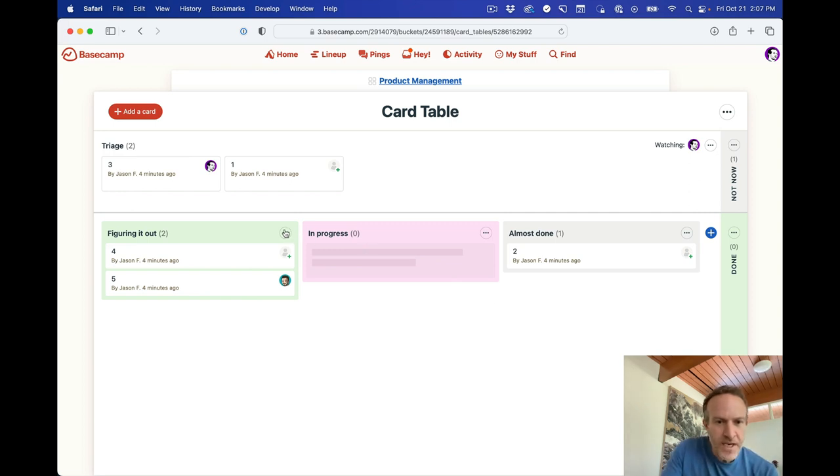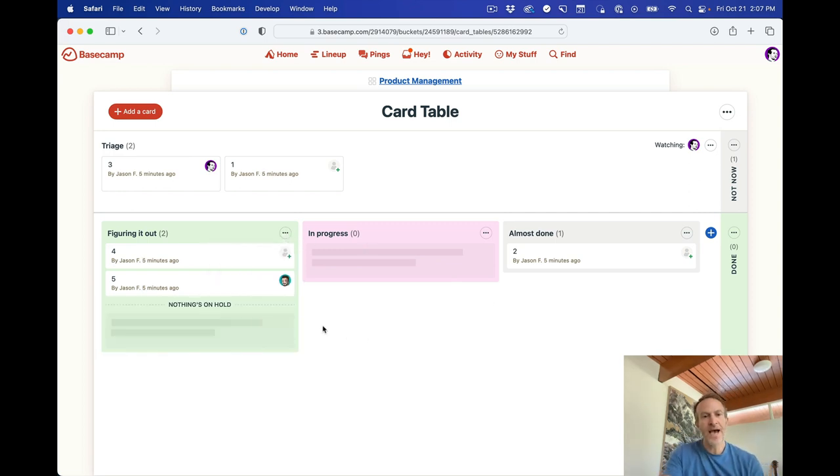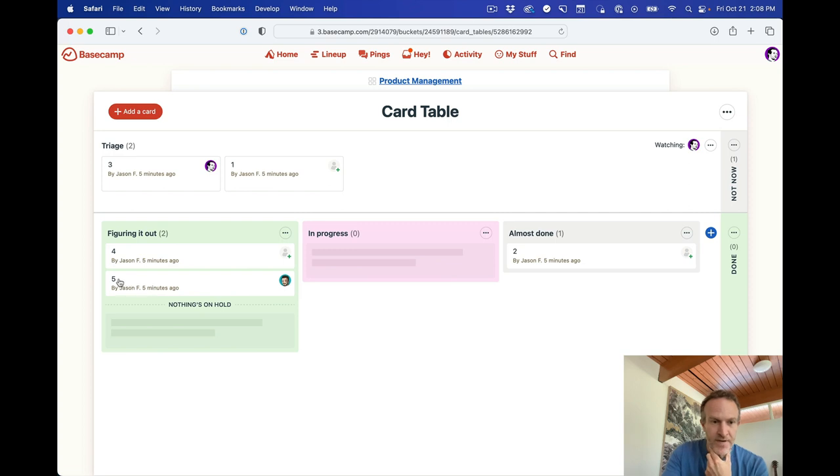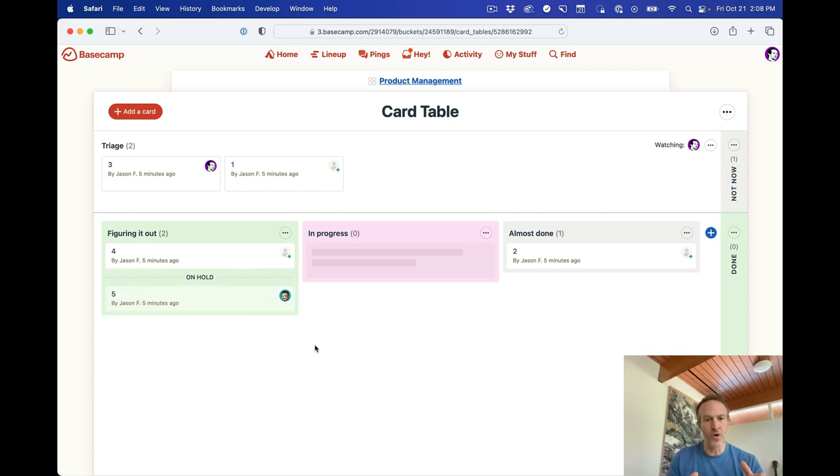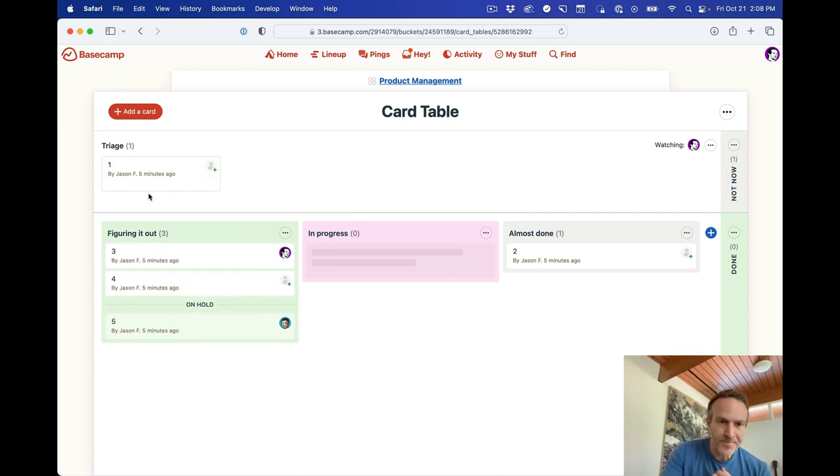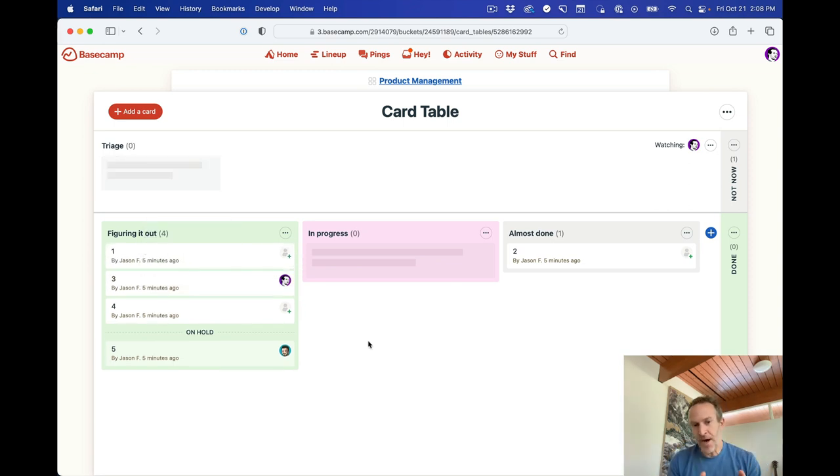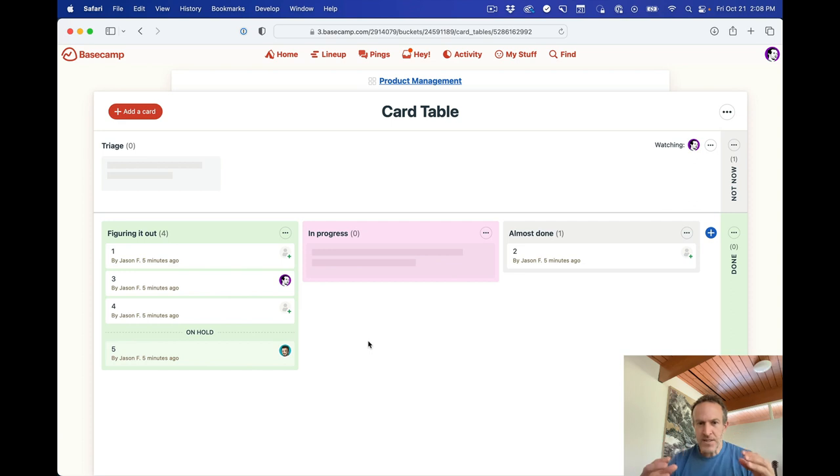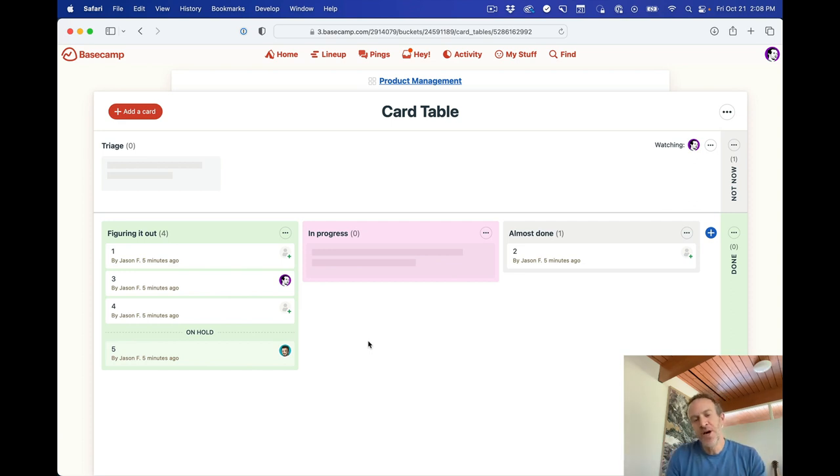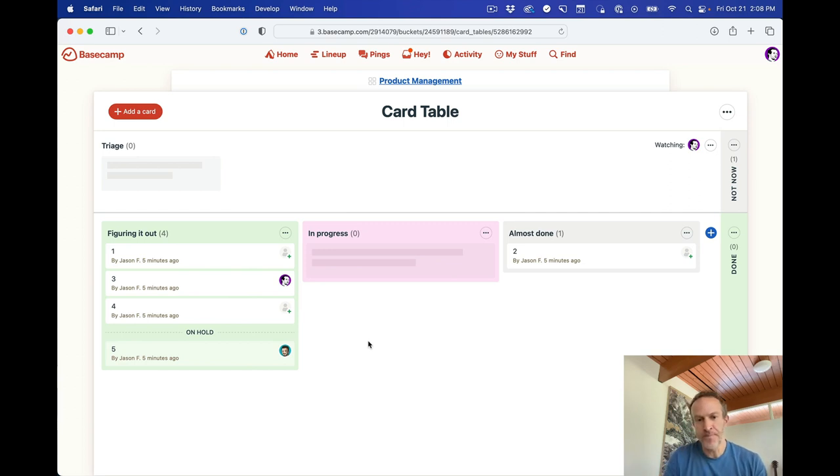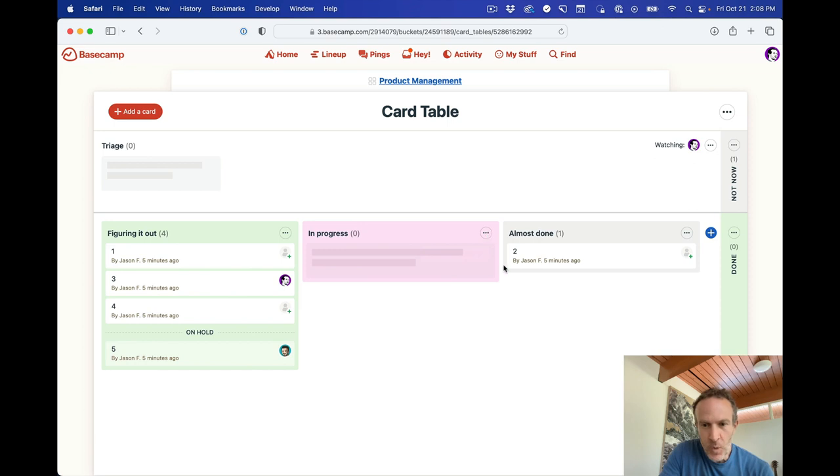So in any column, you can say enable on hold. And now there's a little section at the bottom of a column called on hold. In this case, there's nothing on hold. If I drag this card down into on hold, it moves down to on hold. It's a little bit dimmer. And it stays down at the bottom of the column. So if you have a bunch of stuff in a particular column, anything that's on hold will stay at the bottom. It means whatever you want it to mean. You can add a comment to it. You can explain what it means when it's on hold. But mentally, you know that this is still in this phase or in this stage, but we're not actively pursuing it for some reason. And I don't have to take it out of the column and lose the context. I just move it to the bottom and call it on hold. So you can turn that on or off for any column, which is really nice.